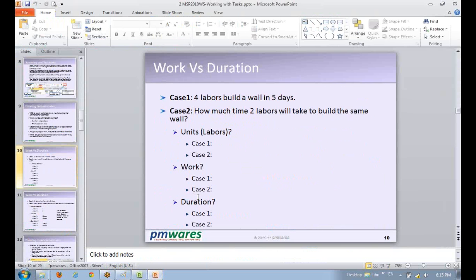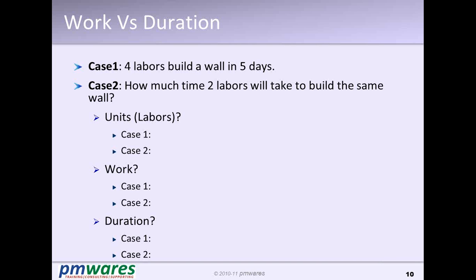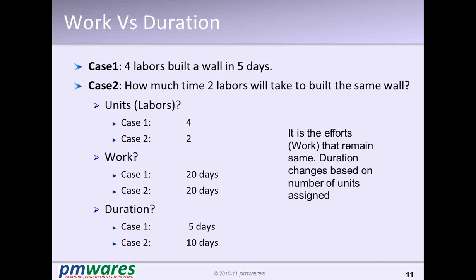Estimate efforts means, when you talk about, look at this. This is a simple case: 4 laborers build a wall in 5 days. How much time will 2 laborers take to build the same wall? Now in the first case, there are 4 laborers, 20 days of work, and the duration is 5 days, right? Case 2, the 2 people, the days are 10, but the work is the same.